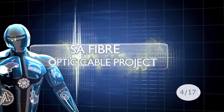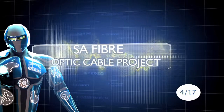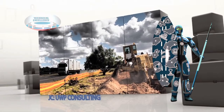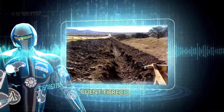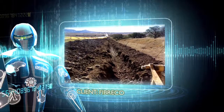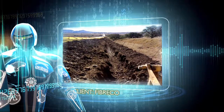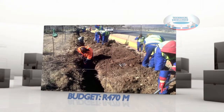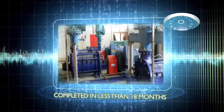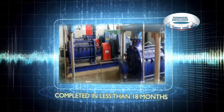SA Fiber Optic Cable project. UWP Consulting, along with SRK, Nimai and Civus MCOP submitted Phase 1 of the SA Fiber Optic Cable project. The client was Fiberco, and the budget was 470 million rand, managing 40 active working fronts and 1,700 site personnel along 1,000 kilometers. Construction was completed in less than 18 months, a record for SA Fiber Optic projects.